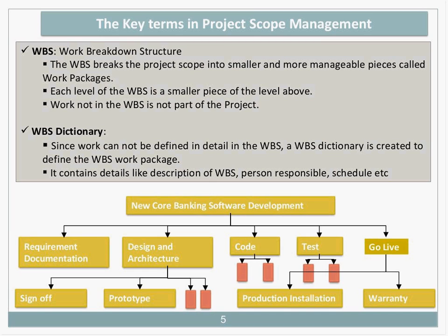The work breakdown structure. The work breakdown structure is one of the most important project management outputs and can be defined as a decomposition of all work to be executed by the project team to accomplish the project's objectives. Each descending level of a WBS represents an increasingly more detailed definition of the level above. Example on the screen.